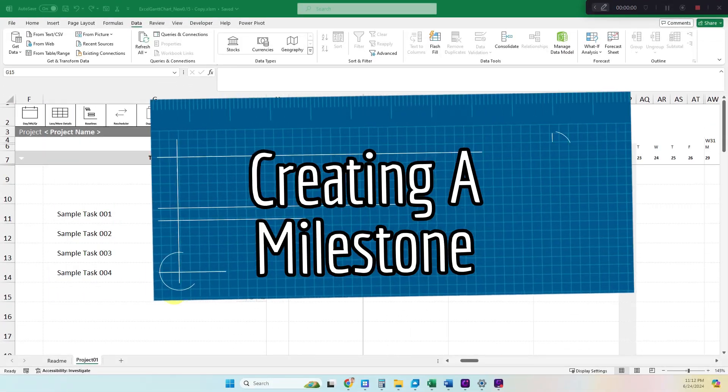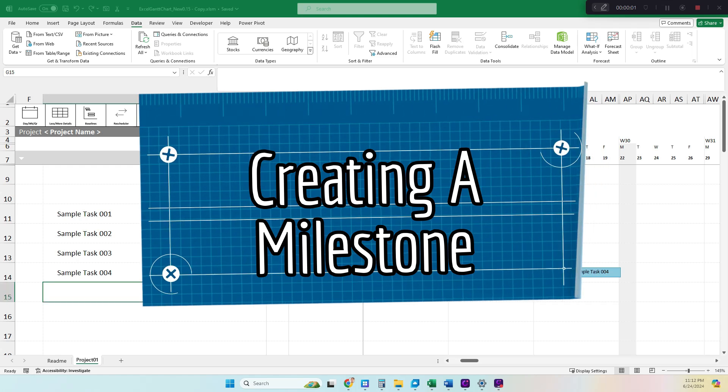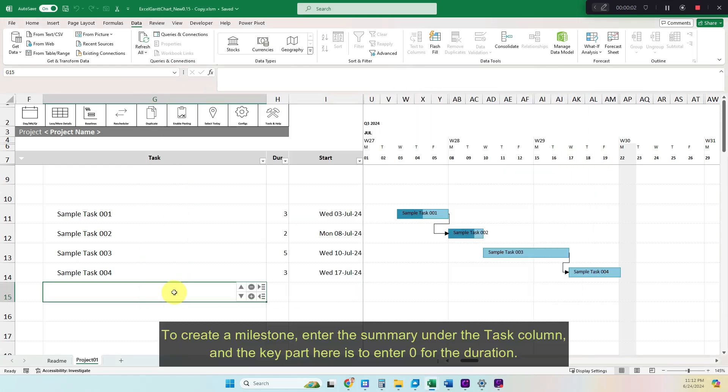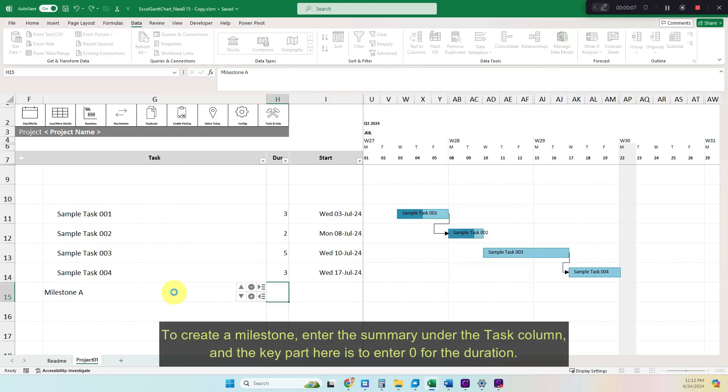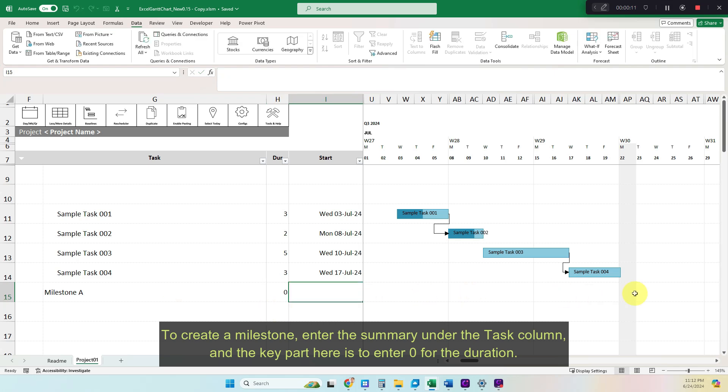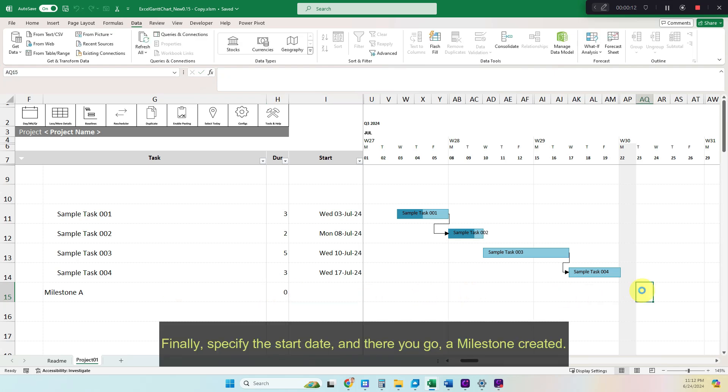Creating a Milestone. To create a milestone, enter the summary under the task column, and the key part here is to enter 0 for the duration. Finally, specify the start date, and there you go, a milestone created.